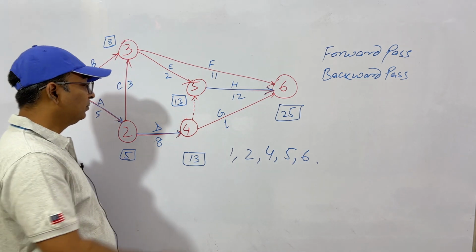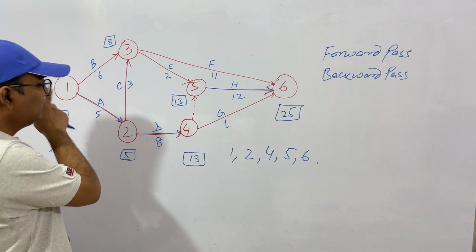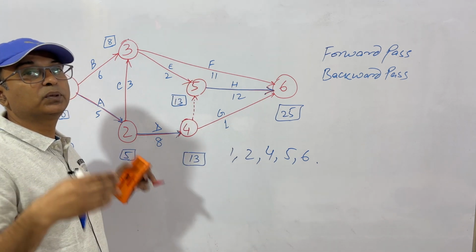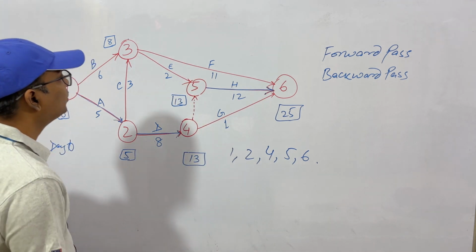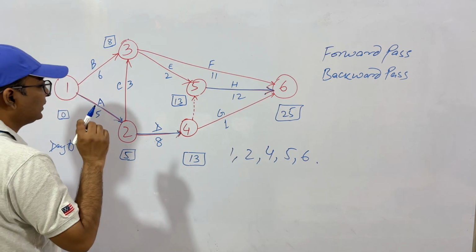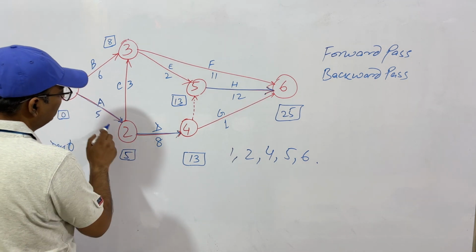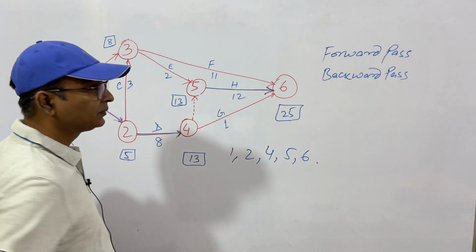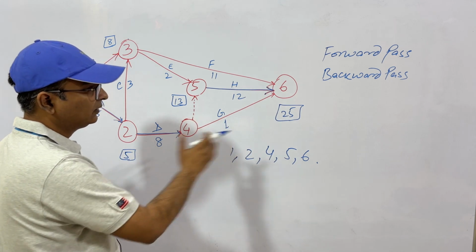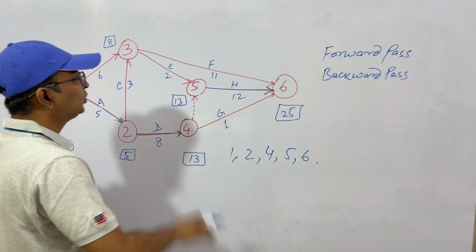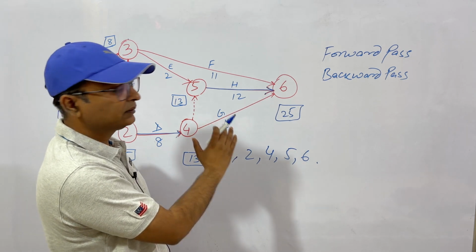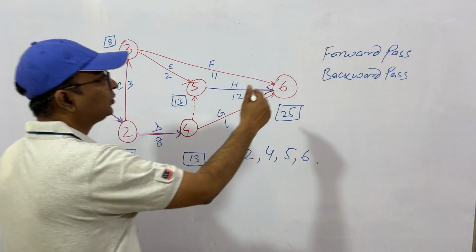of the project. But if you have any delays in this and this one, your time for the project will be delayed. So the most important activities, the critical activities for time scheduling, are this, this and this. Clear? And the time taken in this path is the total time taken for the project. So this is from 0 to the 25th day, this is the forward pass. Clear? So this was the forward pass.